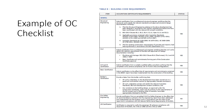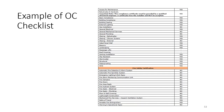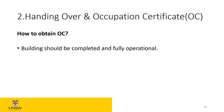The builder provides a certificate confirming the building was built according to the BCA. The fire engineer and even the lift require certification. The fire safety component covers: fire hose reels need to be tagged; fire alarm monitoring system (FIP); fire hydrant system; fire seals and caulking. All fire safety items need to be checked. From a physical standpoint, the building should be completed and fully operational — practical completion reached, all testing and commissioning completed, and the PCA or council will do their final inspection.